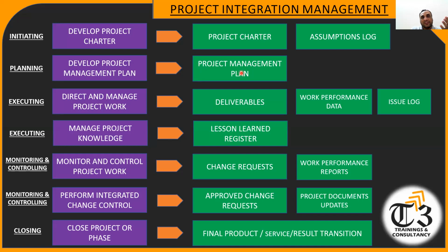So 10 management plans, 3 baselines, all the documents which you have produced, Gantt chart also, and most importantly, the change management plan and configuration management system. What is the configuration management system? It maintains the configuration of the product, how the changes were made and what the reasons were. So the configuration management plan actually maintains the version of the product, that is, was it version 1, version 2, version 3. And it also contains the governance, how you can make changes in the project requirements.